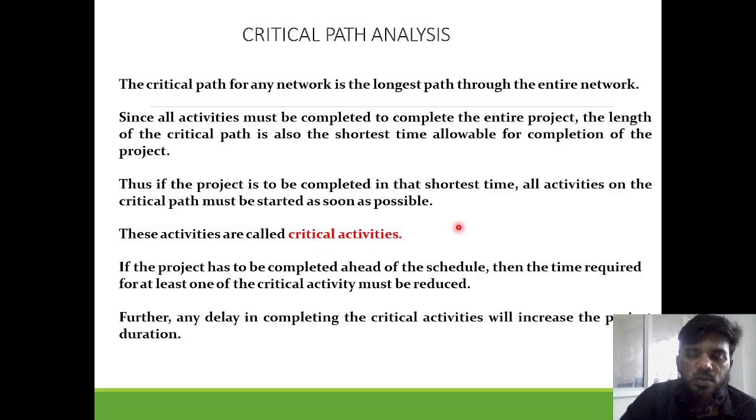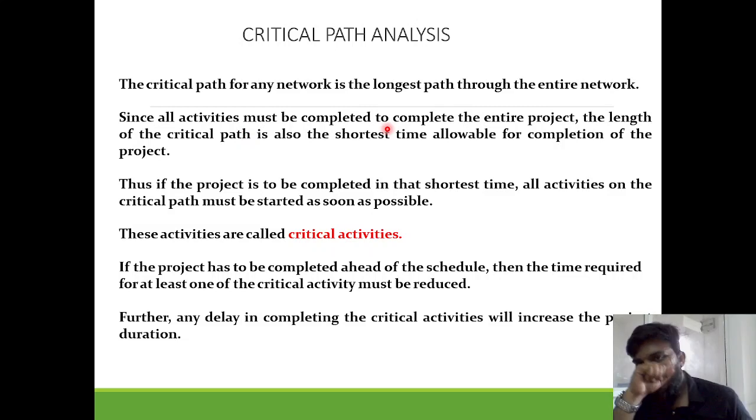unless there are tough problems or a large theory part is asked here. So, the critical path analysis: what is this critical path analysis? It is nothing but selecting the longest path among the whole network. Since all activities must be completed to complete the entire project, the length of the critical path is also the shortest time available. The length should be longest, whereas the time consumption should be the shortest time allowable for completion